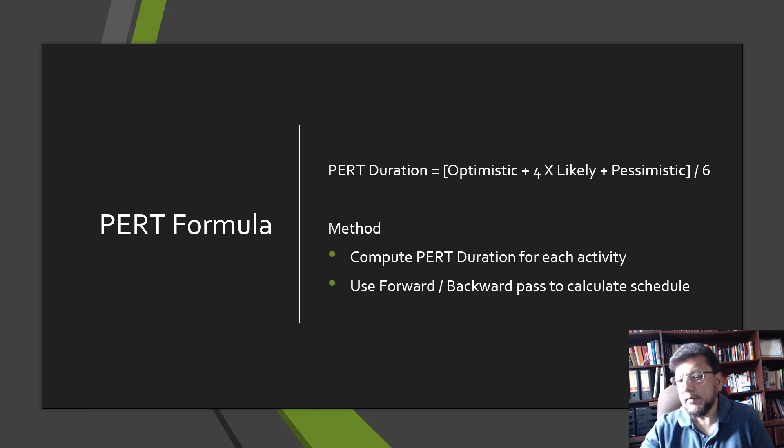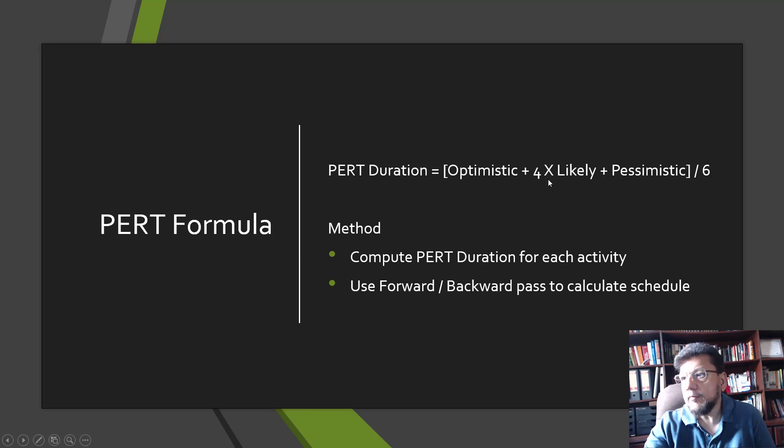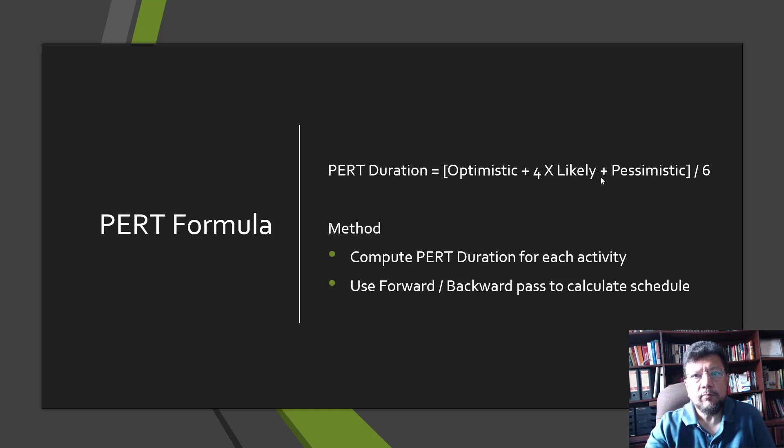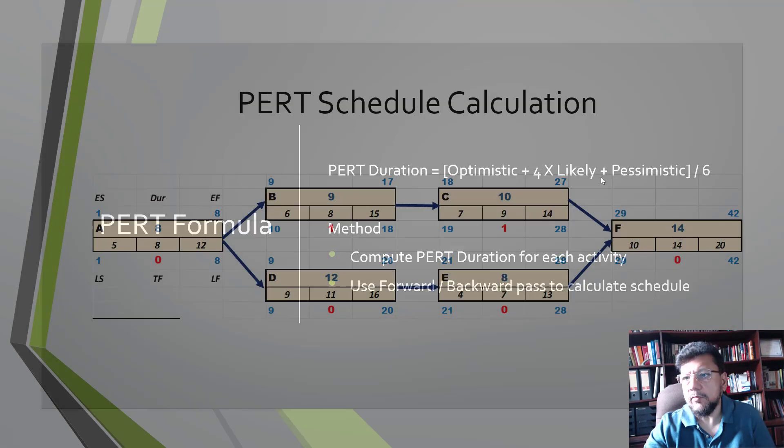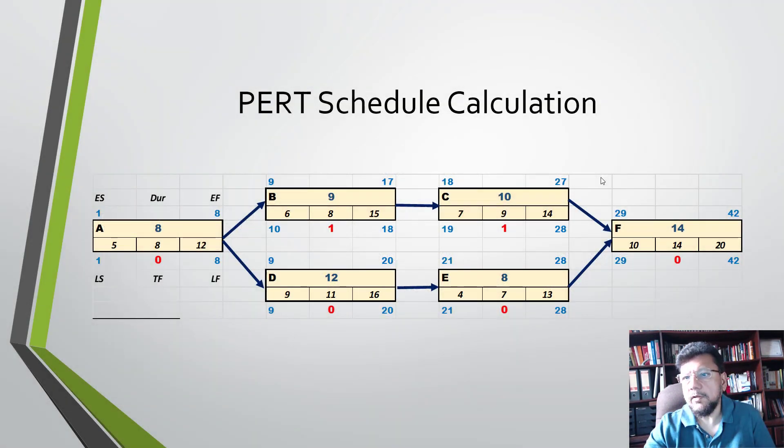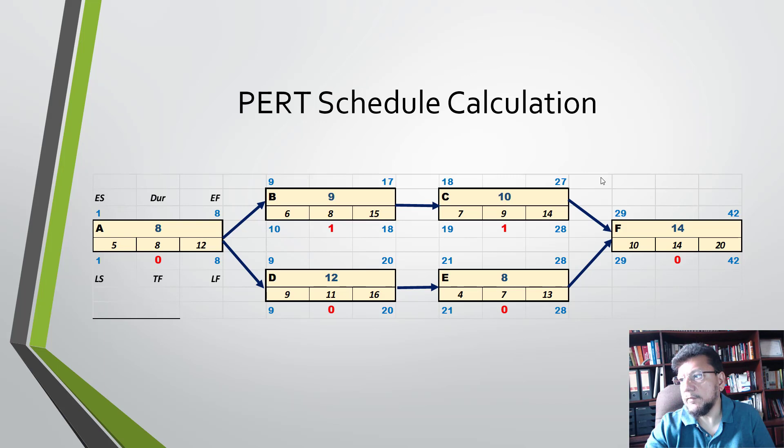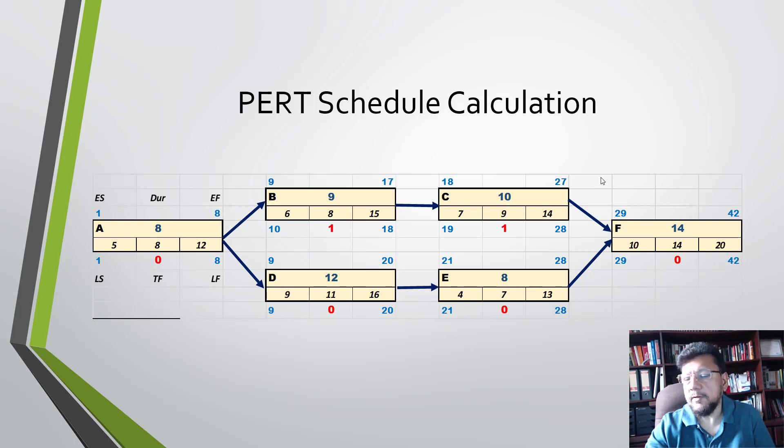PERT duration is basically a formula that takes the three-point estimate and turns it into a single value. The PERT duration formula is: you take the optimistic value, plus four times the likely, plus the pessimistic, and divide by six. In this case, if we put in the PERT values, we now have a scheduled duration of 42 days.